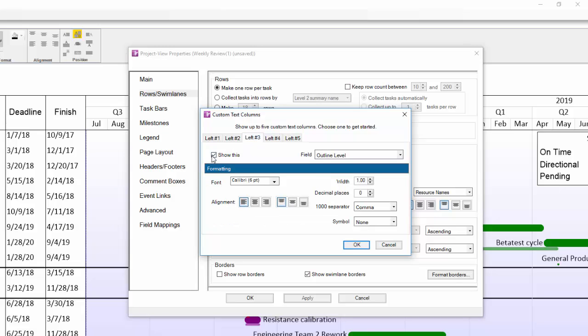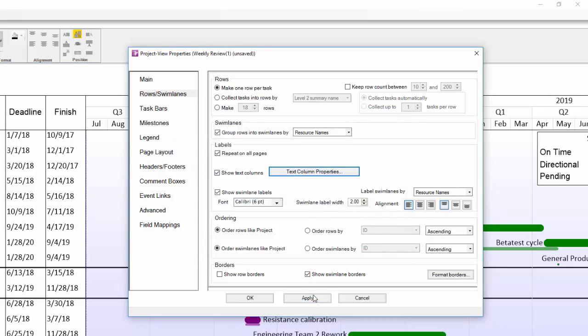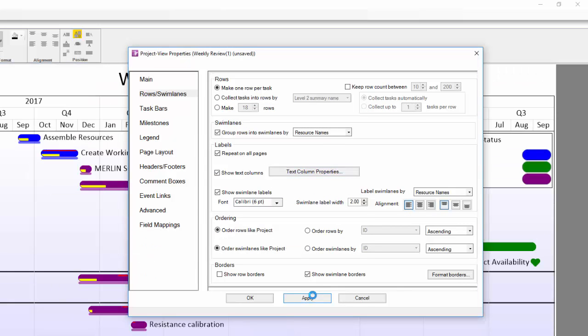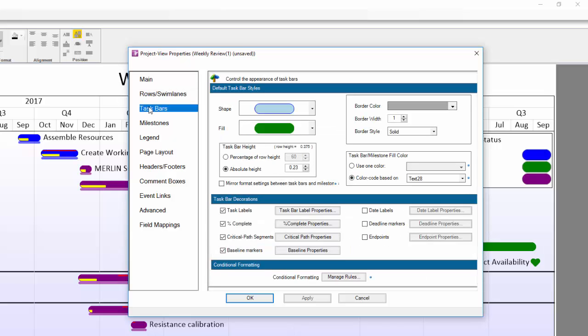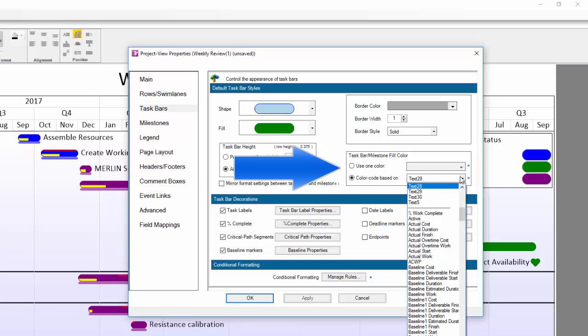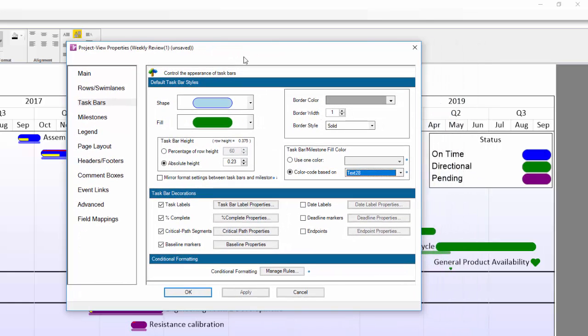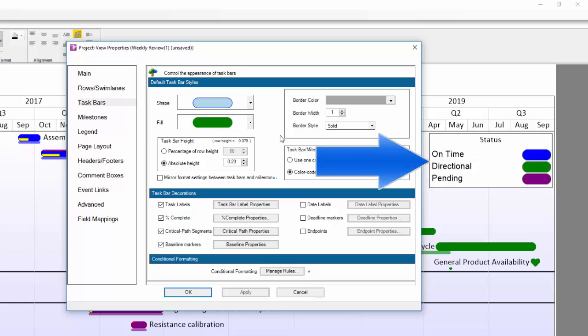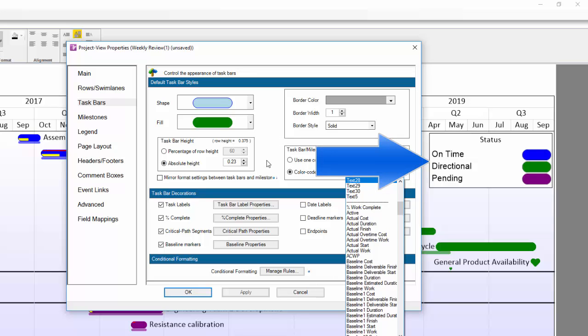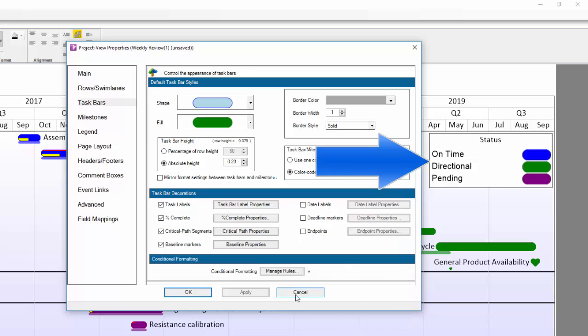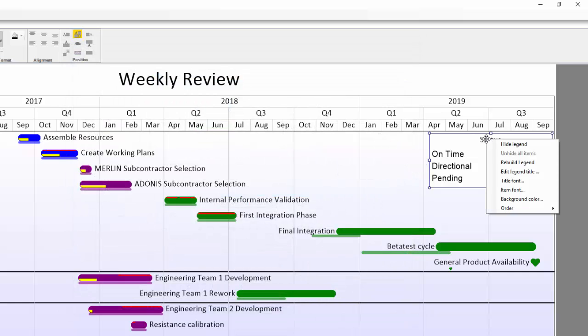If you don't feel like building in conditional formatting rules, OnePager can also color your tasks based on different values in one of your source file columns. To modify what column is controlling the coloring of your markers, go to the task bars or milestones tab. There is a setting on the right side called Gantt bar slash milestone fill color. You can choose to color everything one color or use a column from your source file. In our example, we're using the status values from our source file. This will also control what you see populated in your legend.